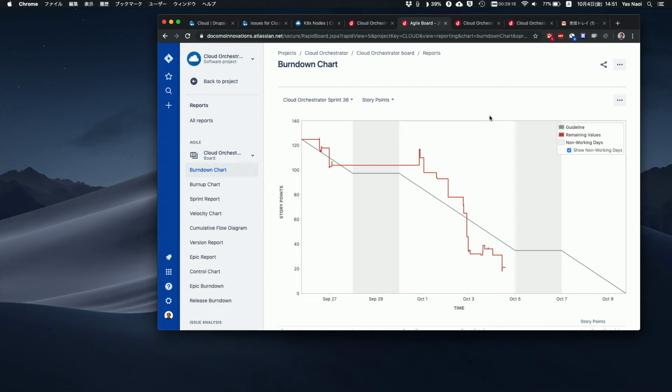At the beginning of the sprint, we figure out what the story point of each task is. And if we think a task could be 21 story points, then it must be broken up. So maybe up to 13 or 15, one person can handle for one task, basically.